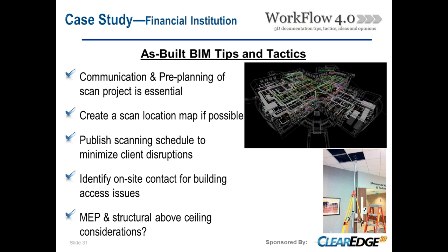We also find that having an on-site contact for building access issues is pretty important, in particular for this project. Undoubtedly, on any scanning project, you're going to need access to a particular room, and you need to know who to call because time is money, and there's a scan crew waiting to get in the room, and that's not good for anybody.